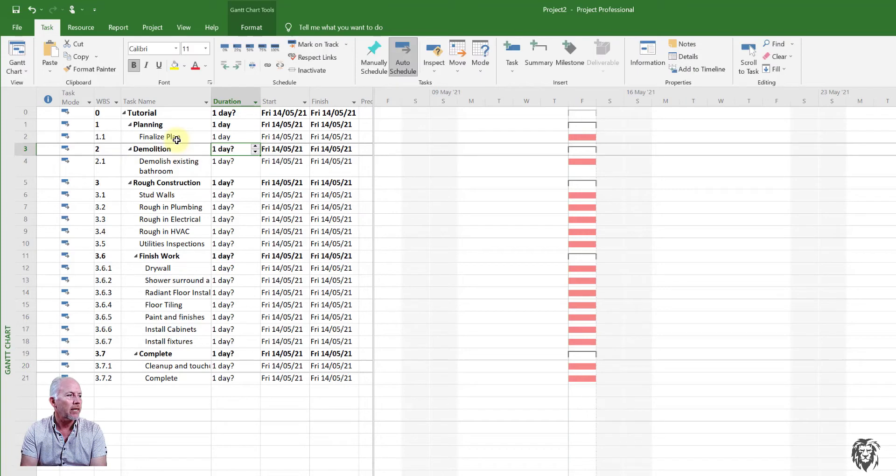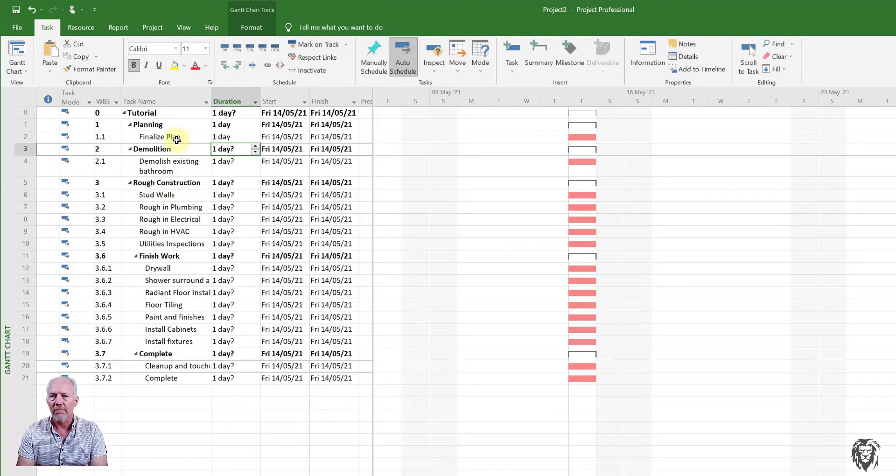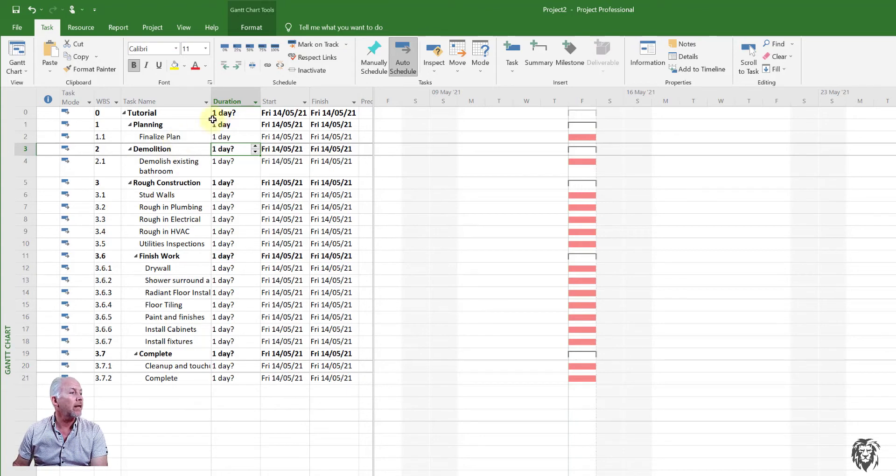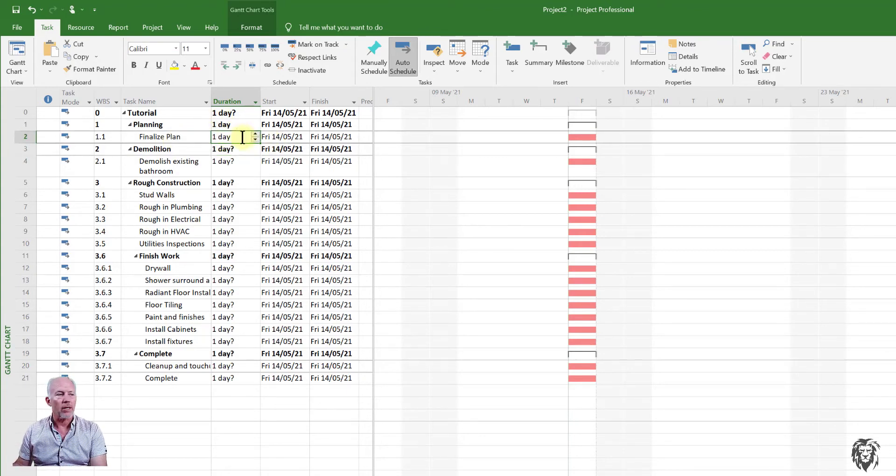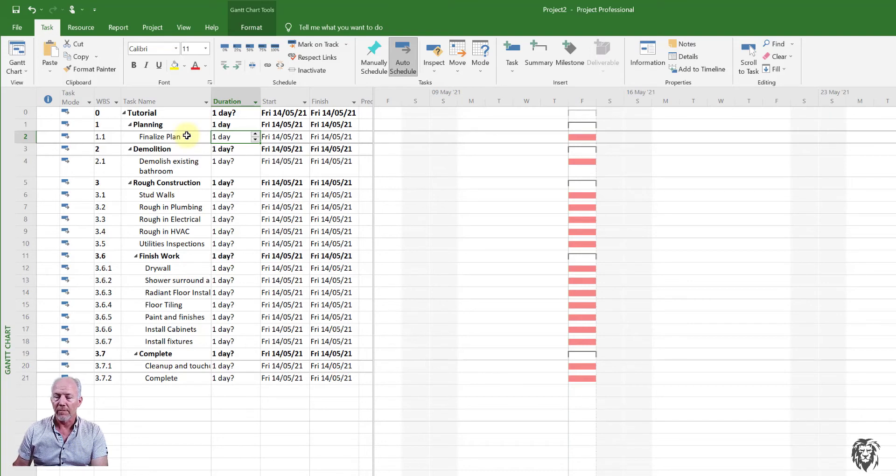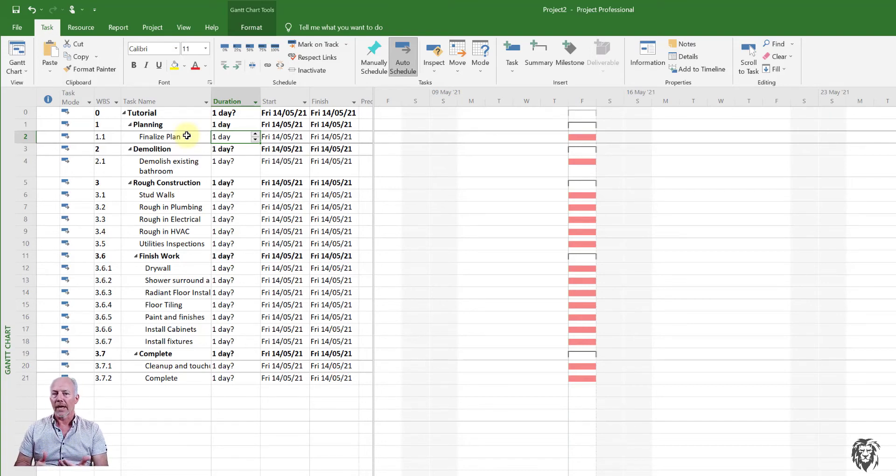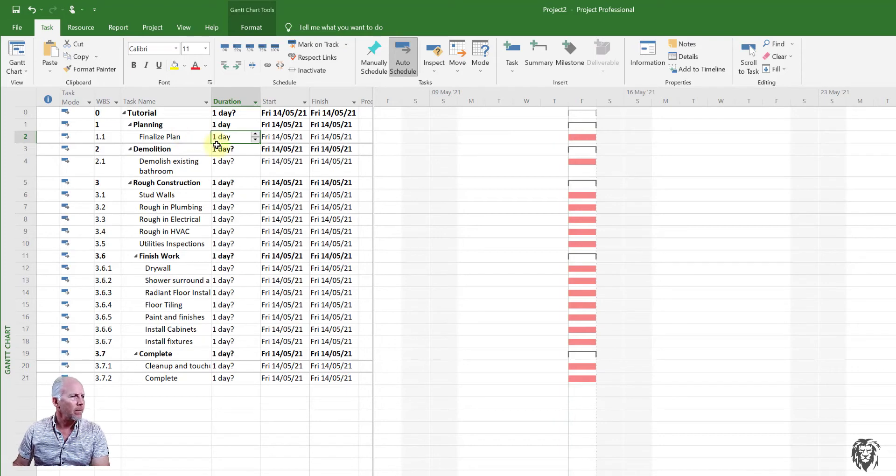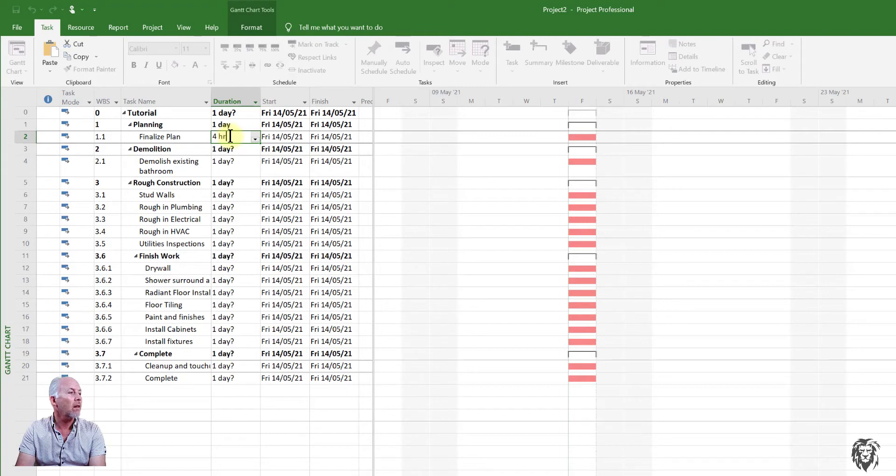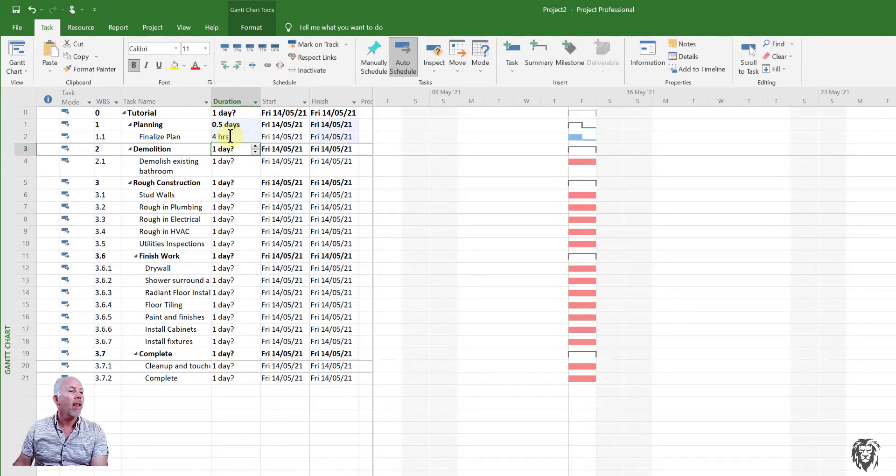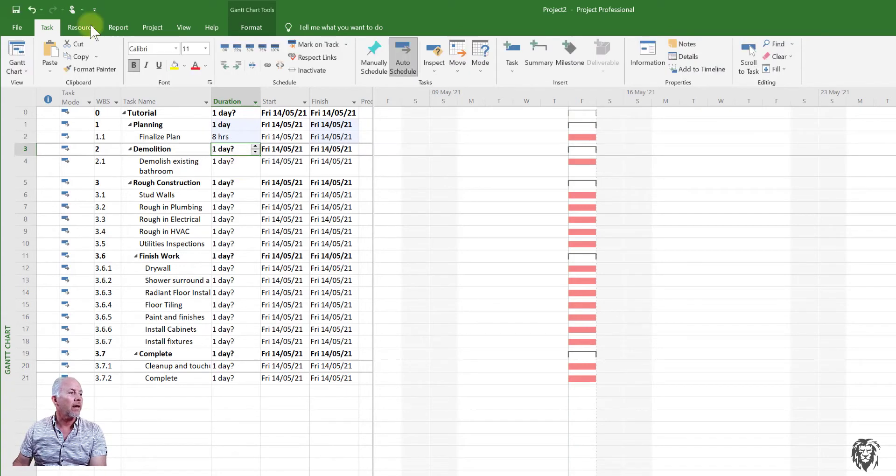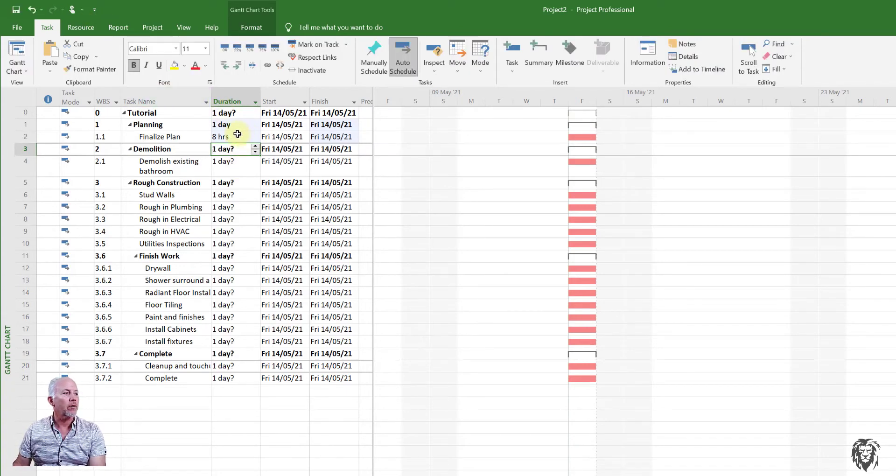And we can put that in here in a number of different ways. So we could say it's going to take a day to finalize the plan, sit down, get it done, get it sorted. Now, keep in mind that that one day, and you see that the question mark disappeared as soon as I did that. That one day actually is representative of eight hours of work because our calendar has one day equal to eight hours of work. So that's fine. Now I could have put it in here as say four hours. And that's not a problem. You see it shows up as half a day. Or we could do eight hours. And that will be interpreted as one day in the summary task. I could also do it in weeks, one week. And you see how the project changes.